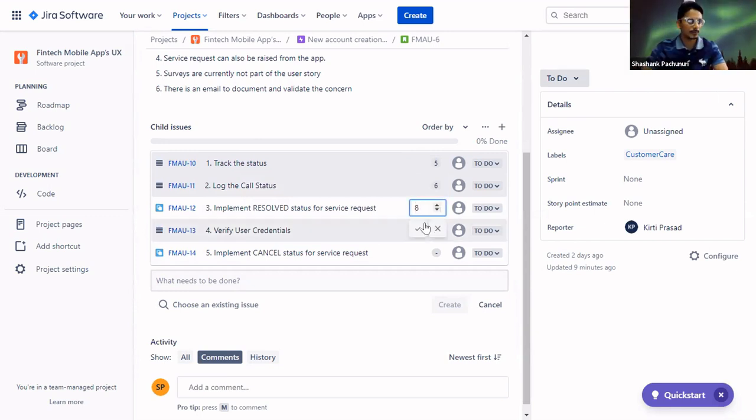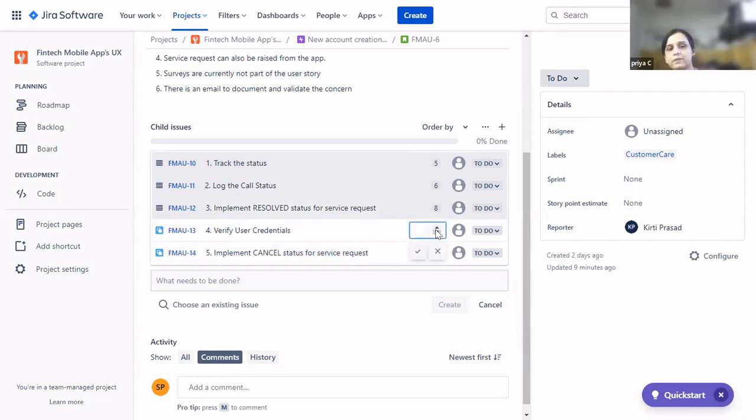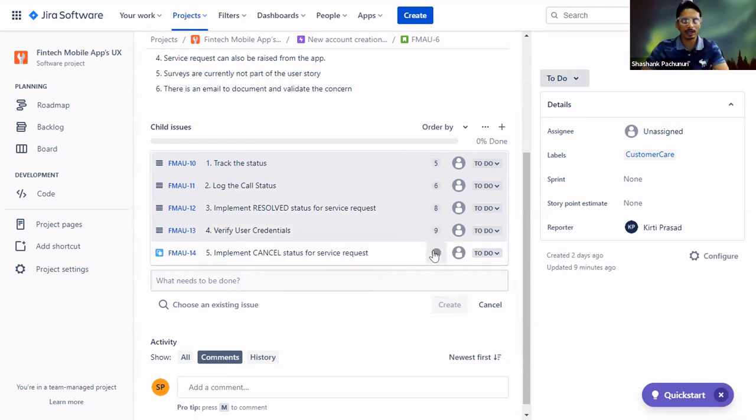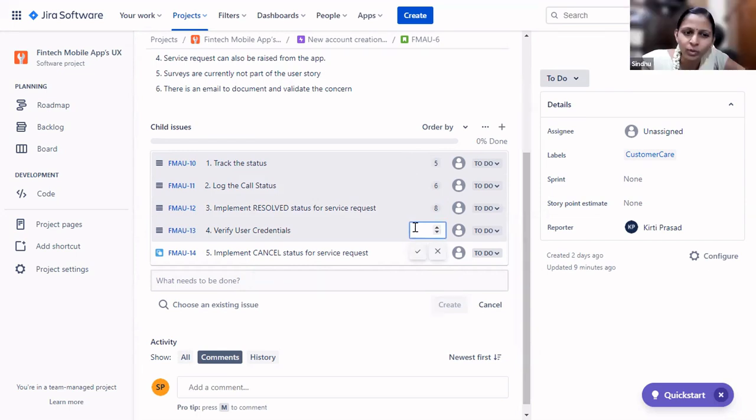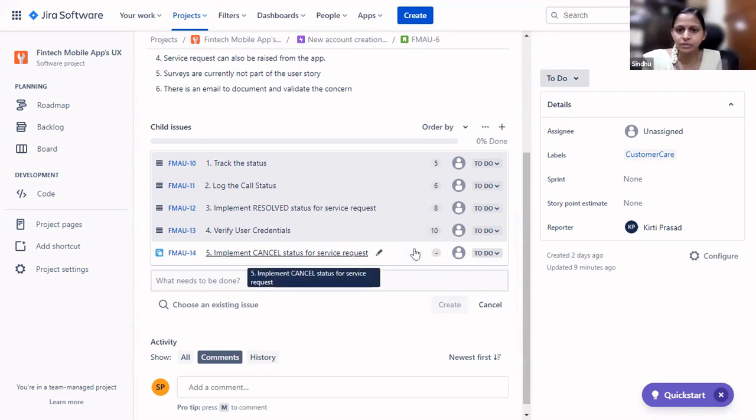Okay, cool. Thanks, everyone. How about verify user credentials? Will take 8 to 9 hours. 9 hours, okay. Let's have some buffer, guys, because for verify user credentials, we need to have some security check and all. The credential is matching our DB, those things we have to check. So probably, can we increase an hour? 10 hours, yeah. 10 hours would be good enough. 10 hours is fine. Because it depends on the dependency also, right? If the server is down or something, it takes some time. Some kind of risk we may face when we are validating the user's credentials. Right. Makes sense. Good point, Sanjay.